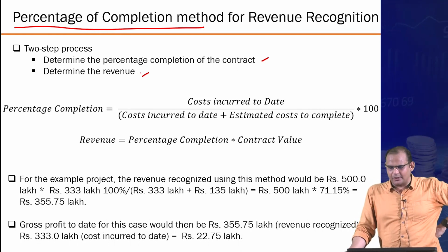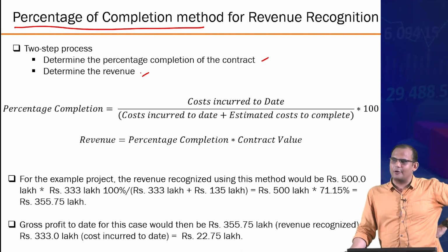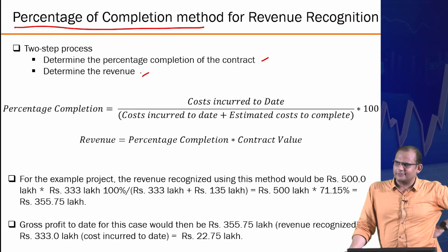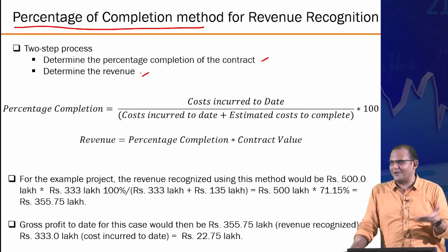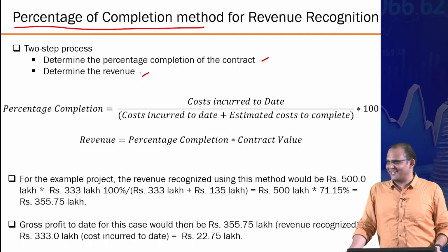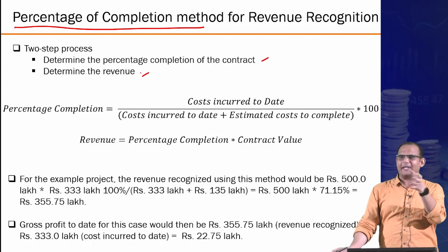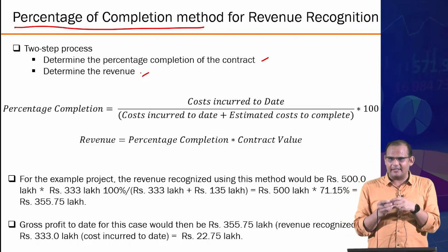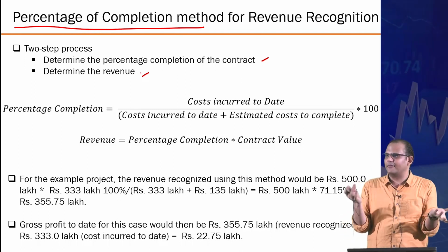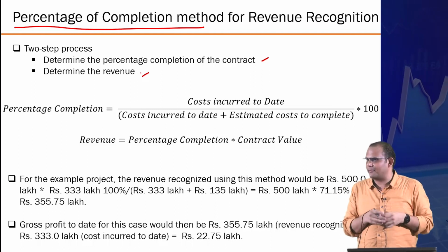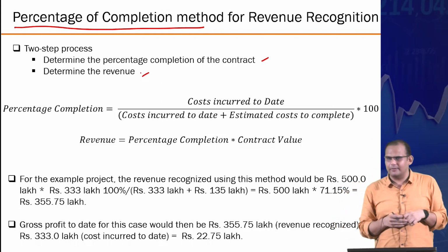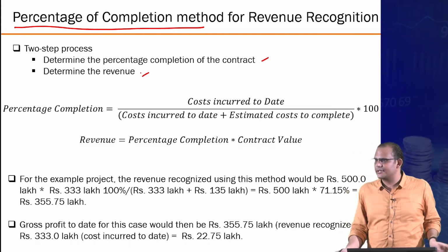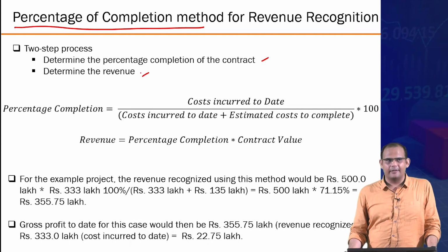Yeah, ideally you could do that, but do you want to do that? What are the drawbacks of doing that? Essentially, you are getting paid for sitting in office, not getting determined whether you are actually working or not, right? So therefore, typically people do not do it on a time-bound manner. Like, if it is a 2-year project, it's on the actual work. You could be sitting for 1 year doing nothing, and you can't call that 50% work has been done, right? So that's the problem. But yes, it can be done where you are assured that output is continuous and you can show that. Right? Any other?